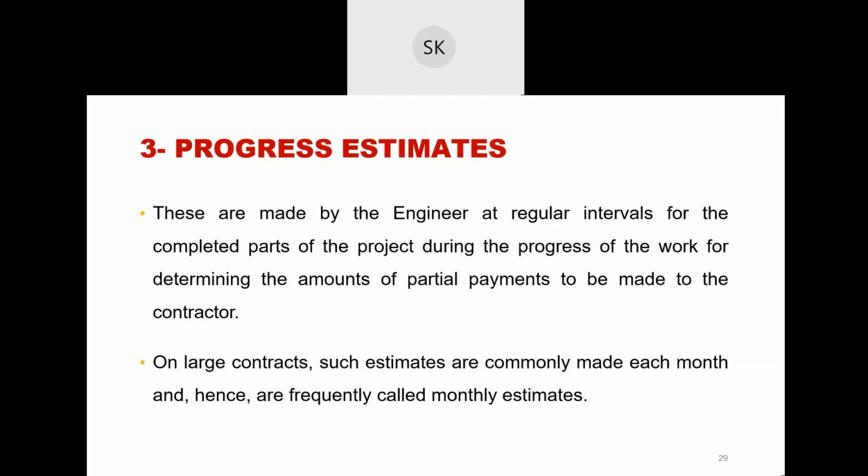First the contractor used to spend his own money in constructing the 3 kilometers, 6 kilometers. But after 3 kilometers, he submits the bill; basically the bill is the estimate of how much expenditure he had made as per tender. He has to follow the BOQ. Suppose in the BOQ it is written that earthwork will be 613 square meters.